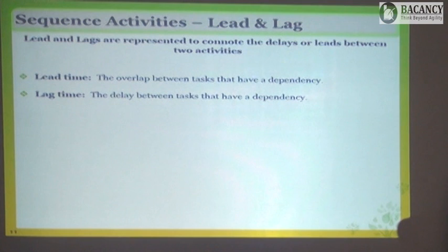For squeezing the duration we use two techniques. First is called project crashing. You know what is project crashing? Any idea, sir? Project crashing is adding more resources to the project so they can work faster. If you have to construct a wall of 10 meters, one person doing that will take 10 days. You want to finish it faster, you will add one more resource. Now they can finish it in 5 days. That is your project crashing.